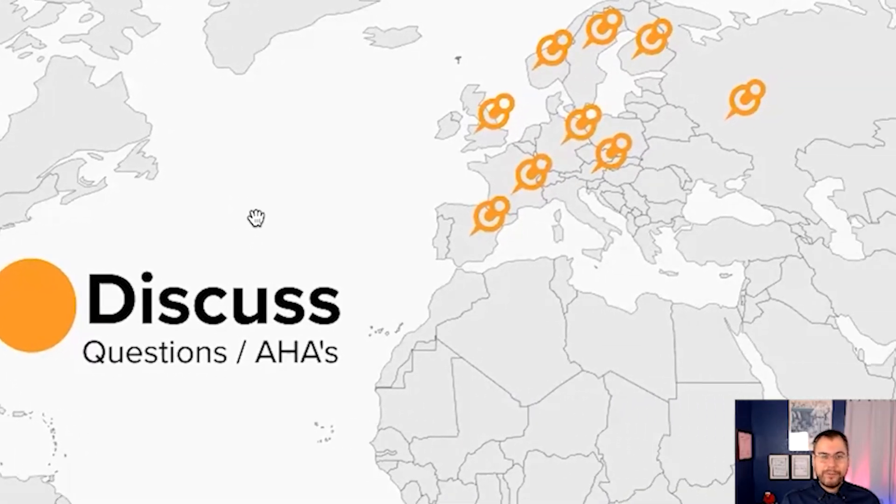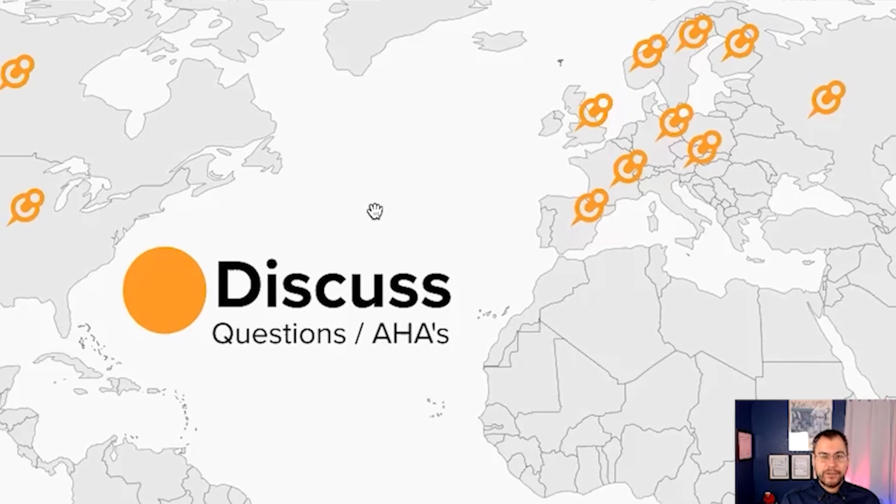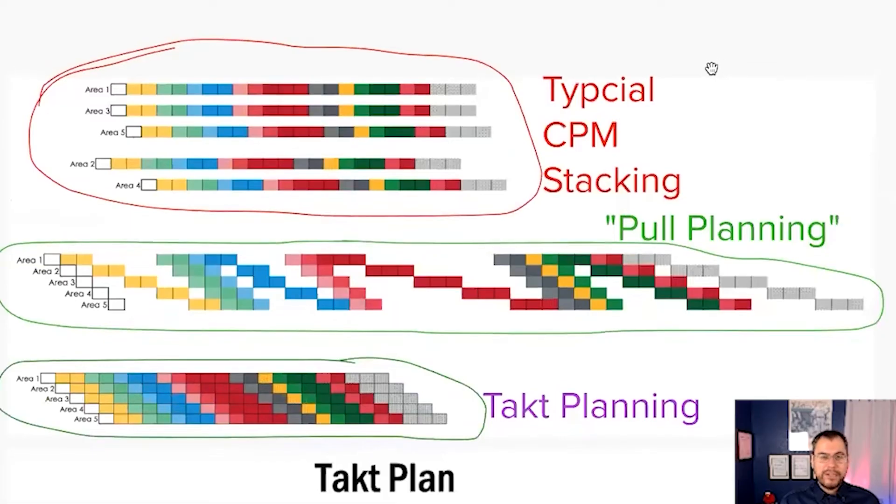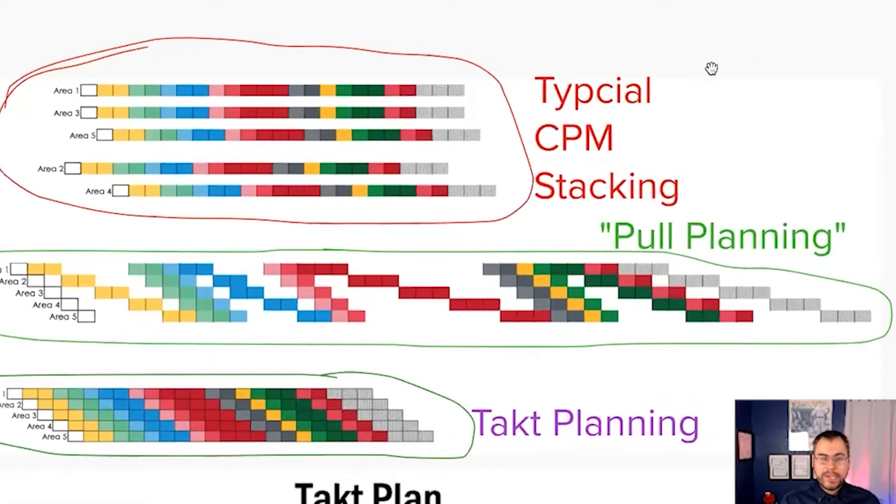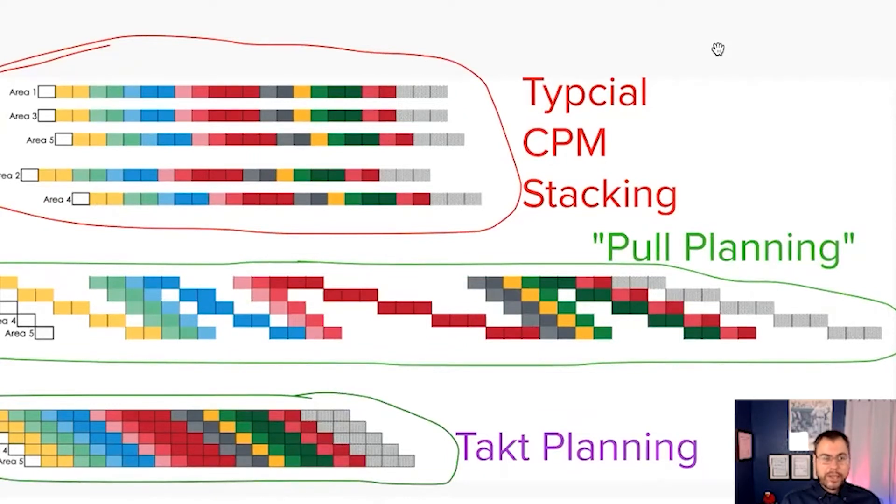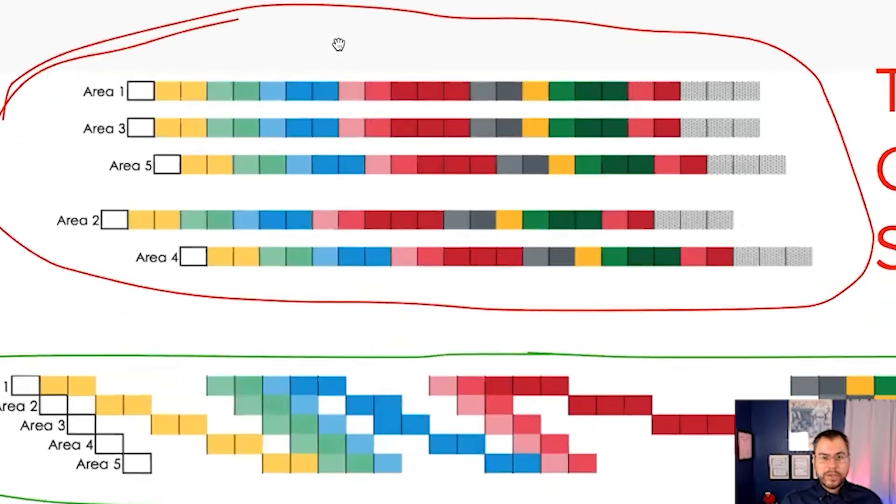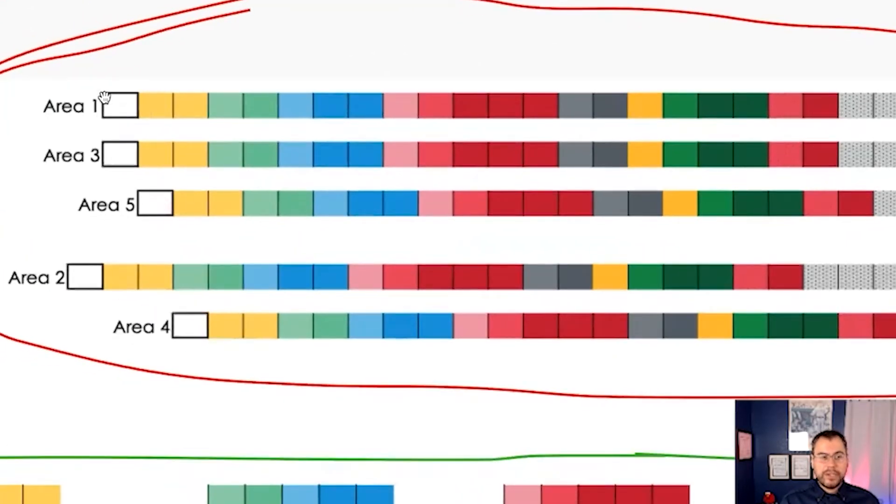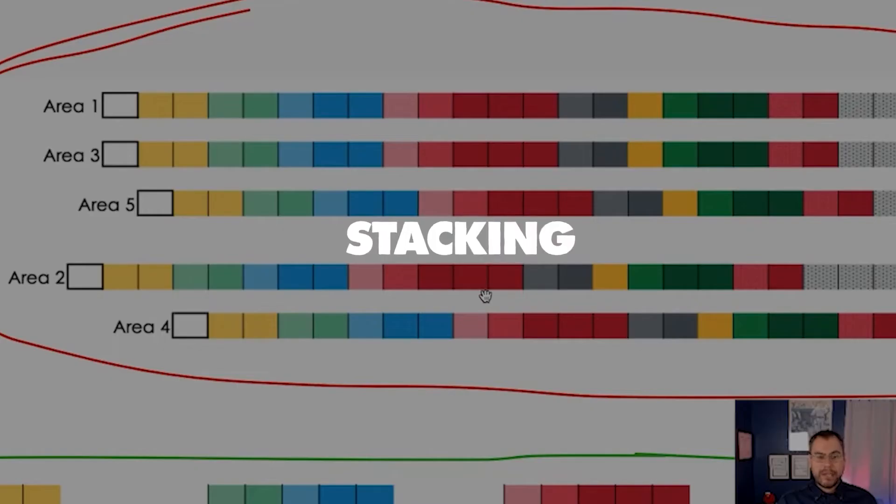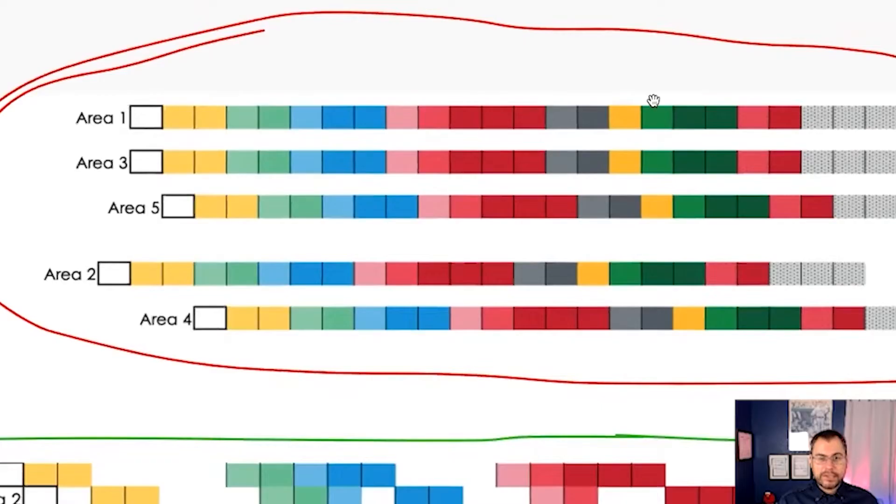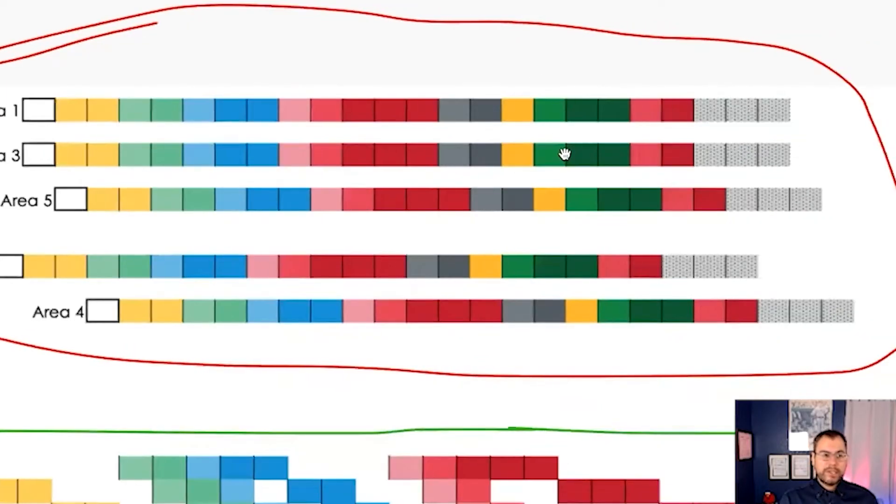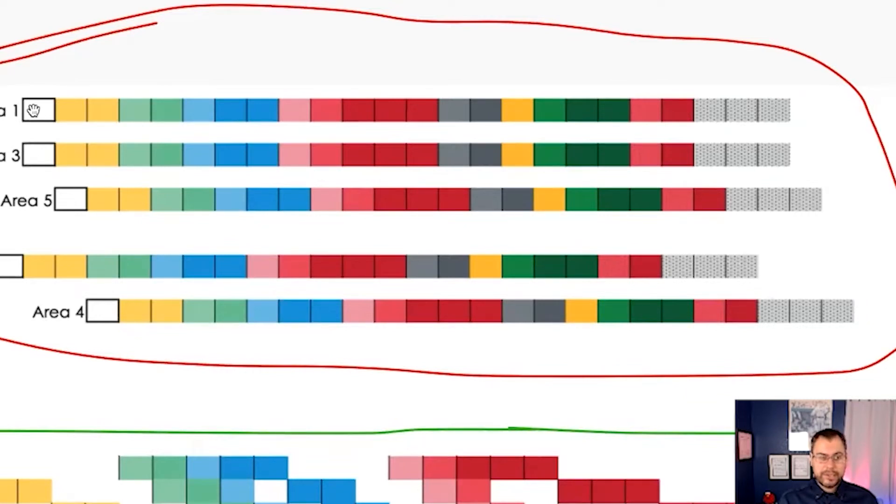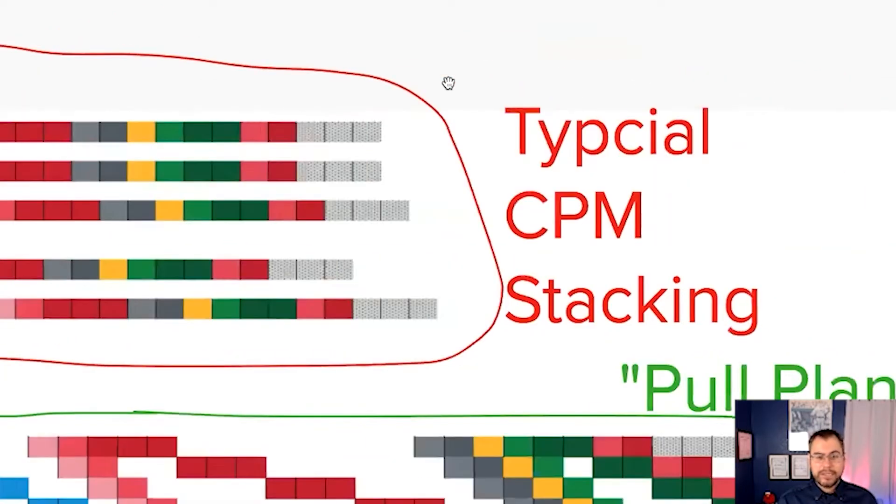If you take a typical critical path method schedule and just push it into a spreadsheet, you'll see that what we have is a lot of stacking. So each color represents a different company. We've got areas on the left, or what we typically see in CPM work breakdown structures. And we see we've got stacking in order to make the schedule happen. Yes, the schedule says we'll finish, but it says that we're working simultaneously in five different areas. That's the typical thing we see. Stacking.